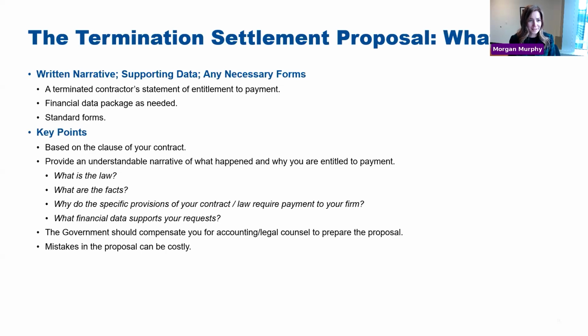So this process has a lot of moving parts associated with it, which is why you want to start off with that plan, and within that plan outline who you need to have involved to help set it up, as well as what you need to be tracking to make sure that when you're asking the government for that final dollar amount, you have support for it. And if the government does end up pushing back on that final dollar value, you can say, well, here's all of our documentation, here's all of our charts, here's everything that we did to show you why these are allowable.